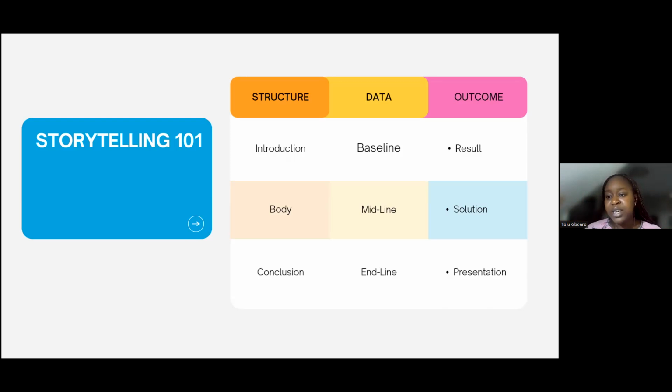But midline, when you've actually started, you go back and say, oh, we're actually dealing with 40 people. And this is the reason why we streamlined from 60 to 40. These are the criteria we looked at initially when we said we were going to look at 60 people. And this is what happened. This is why it is 40.